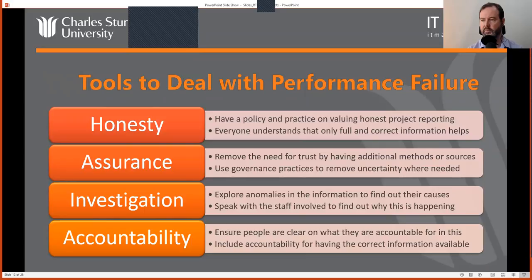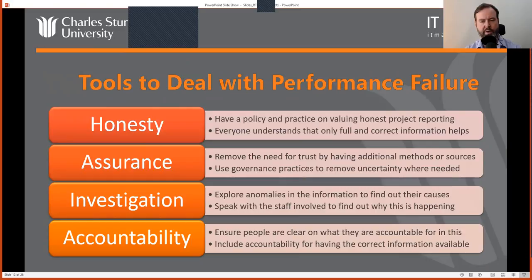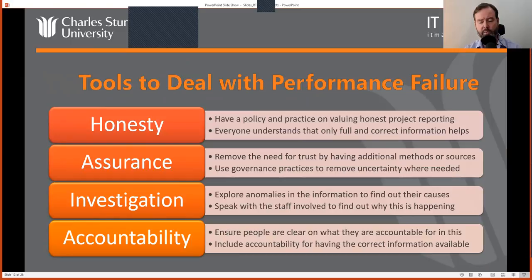On being prepared to challenge a culture you don't think is right: subculturing is one way, but it all depends on where your authority as project manager comes from. Your power to work against culture comes from that source and you have to work within that limit. If you have a strong power source, you can get their mandate — not just for project management, but for cultural adjustments. Have that conversation with your sponsor or board: 'I want to take this opportunity to have some positive impact on cultural change regarding this.' You don't need to be a crusader — just say 'let's have a positive impact.' Get their support and you have a much higher level of power to make changes.